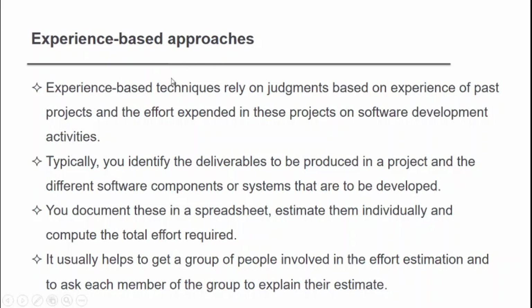Experience-based techniques rely on judgment based on experiences of past projects and the effort expended in these projects on software development activities. Typically, you identify the deliverables to be produced in a project and the different software components or systems that are to be developed.